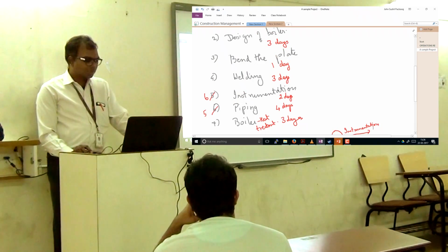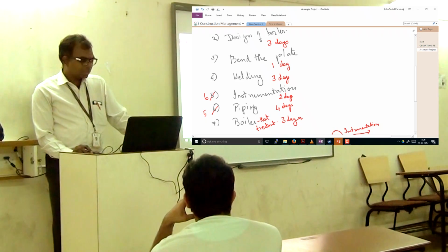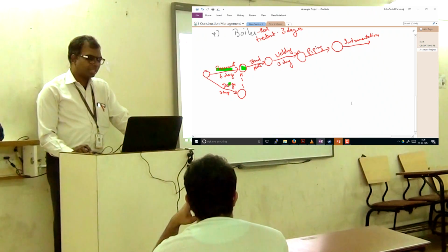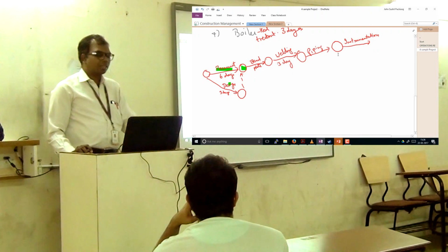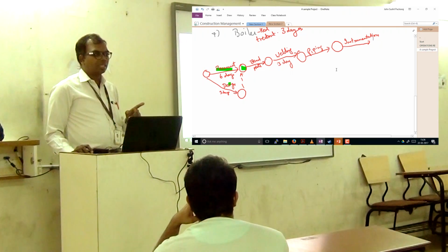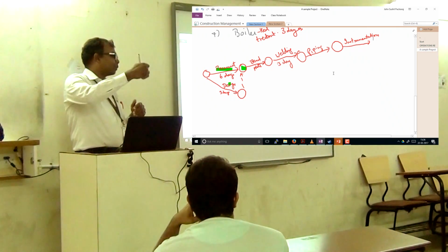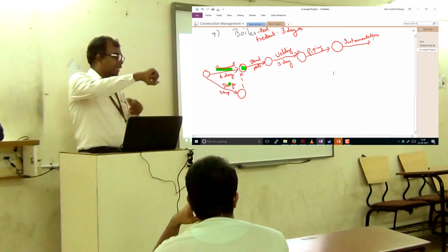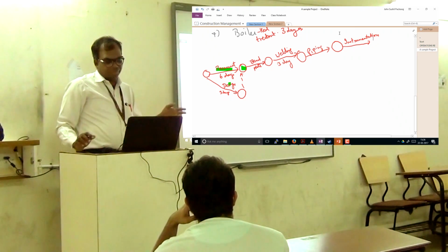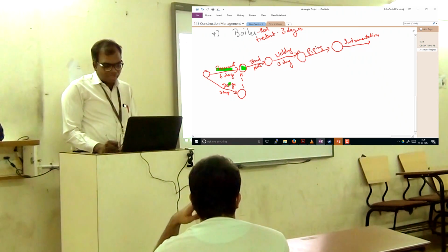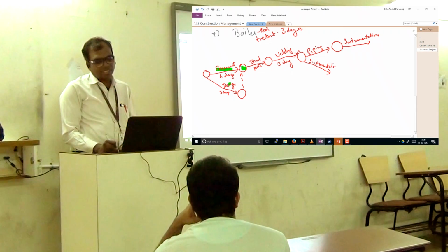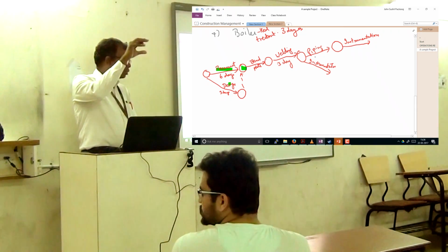Now I got this interchange, and any other thing which I can probably play around, not in particular. So then once I have the instrumentation done, another option is there. As I do the piping, there is a chance that I could do the instrumentation also, right? So when I put a pipe, I might need to put a gauge before I close up the boiler shell fully. So now if you are with me, I could make another loop like this. I could branch it off here and say instrumentation and piping may need to go at the same time.